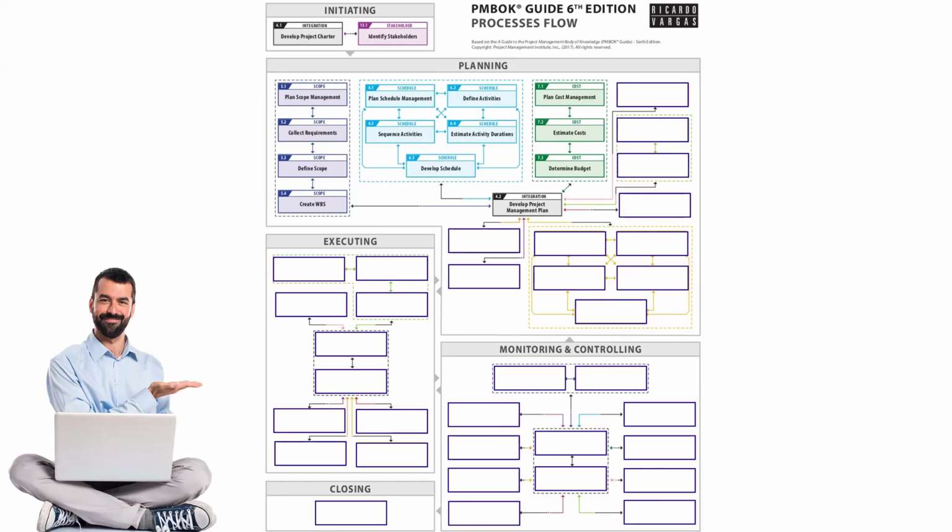And ultimately, actually, to the overall project management plan or any of the project documents. So out of the 10 areas, we have only 3 baselines. We don't need to create a baseline for quality, for resources, for risk, or for any other area, but these 3 areas have to be baselined.